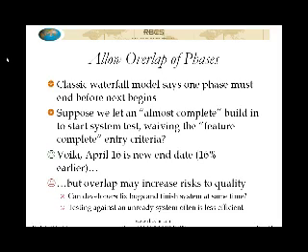Okay, so maybe that pulls in the end date by, say, 2 weeks, right? If we rerun the schedule, we start when we get the core build, and 2 weeks, and that pulls April 30th into April 16th, okay? So that looks good. Maybe people are happy about that, but you have to be realistic about what the price you're going to pay for that, because now you've increased the risks to quality and the project risks as well, right?